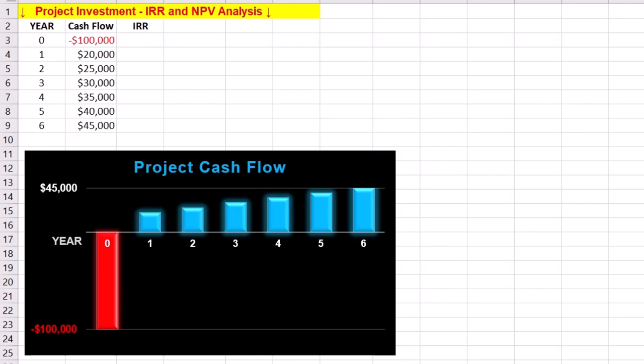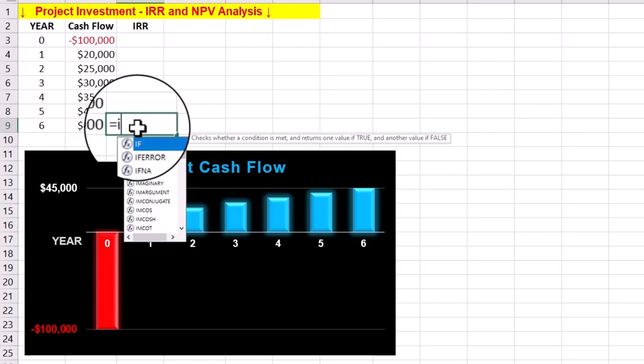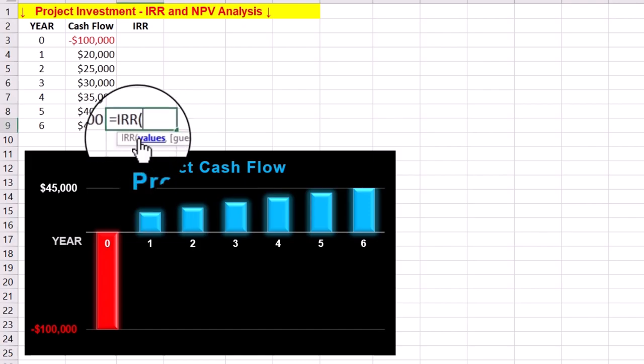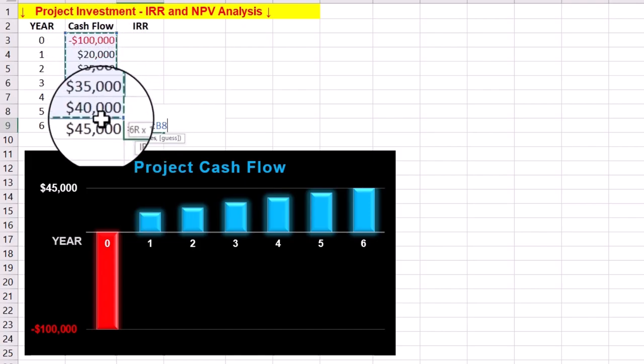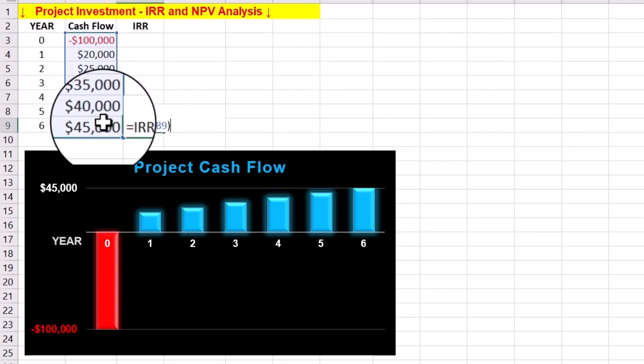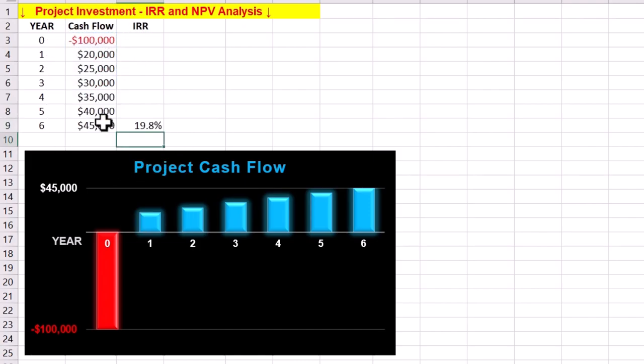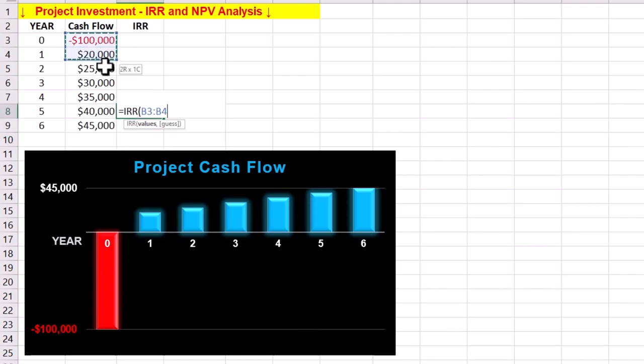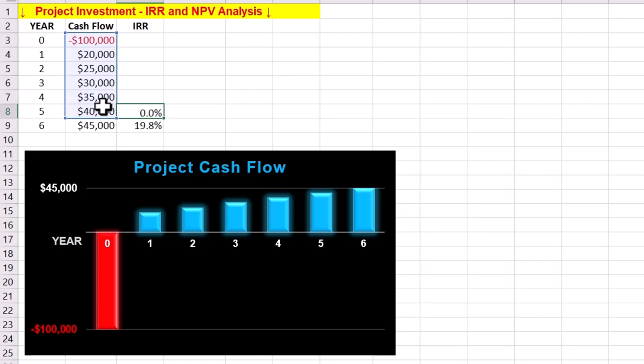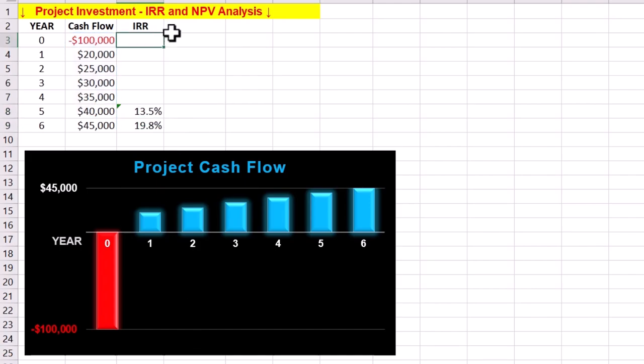To calculate the internal rate of return, enter the IRR function in Excel and select the whole cash flow array. The result is 19.8%, but let's compare it to IRR after 5 years. The value range for the IRR function will be the cash flow array until end of year 5, which results in an IRR of 13.5%. We can repeat the calculations for IRR at different years in our project lifecycle.